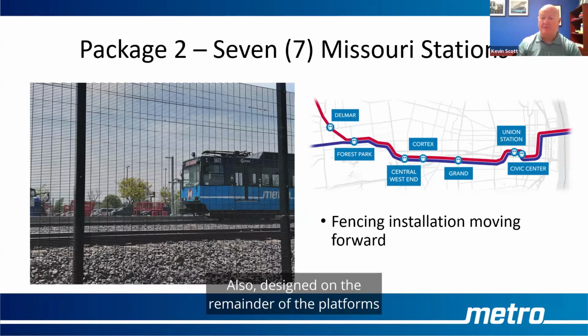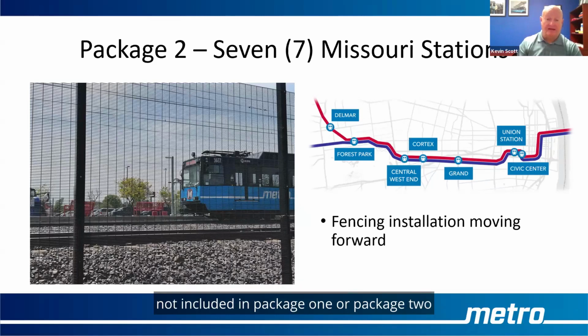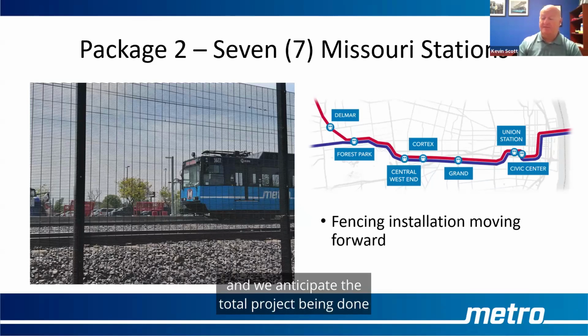Also, design on the remainder of the platforms not included in package 1 or package 2 will be bid for construction probably late November, early December. And we anticipate the total project being done by January of 2026.